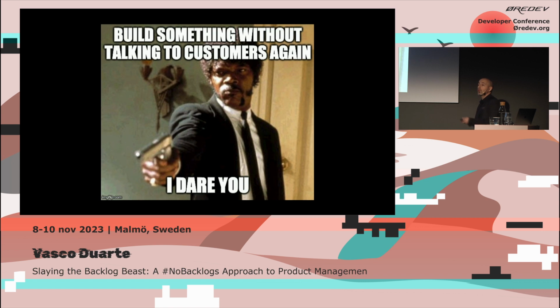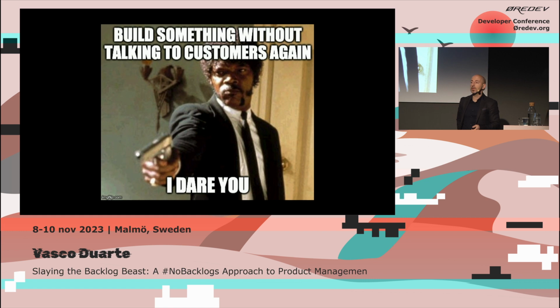Right, I talked to a group of developers. I don't know if any of them is here today. I talked to a group of developers yesterday, and I asked, what is the biggest problem you have today? And they said, well, it's this project planning and project management stuff, and also the people issues. And then as we were going through the conversation, I found out that they had a team that was too big. That was their words. It was too big, so they had to go to 3-week sprints, from 2 weeks to 3 weeks. So now they've increased the length of the feedback cycle.